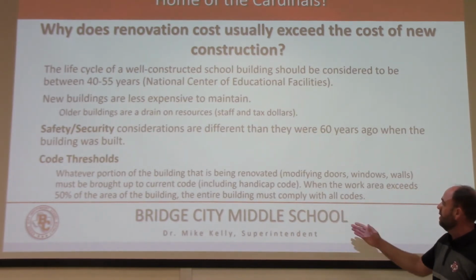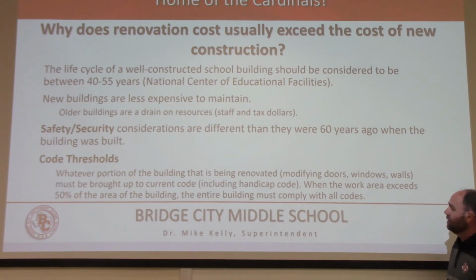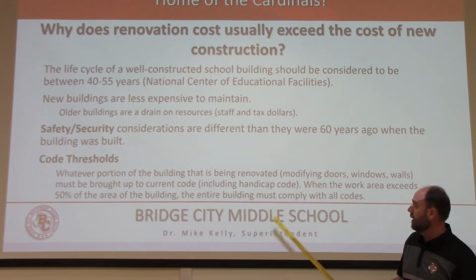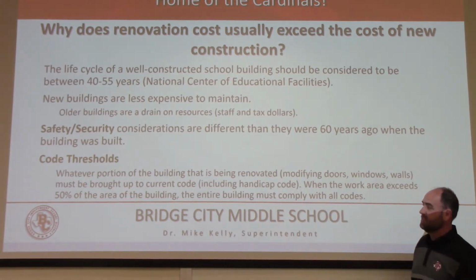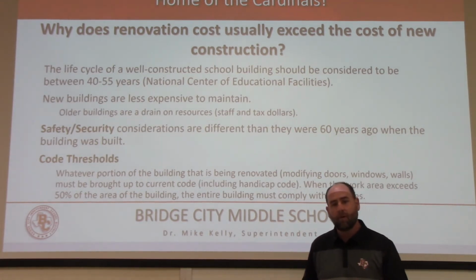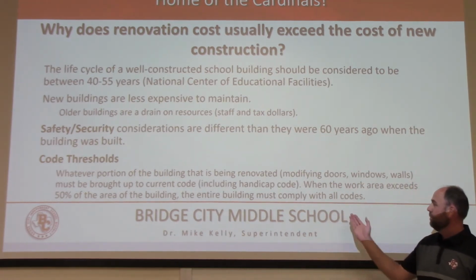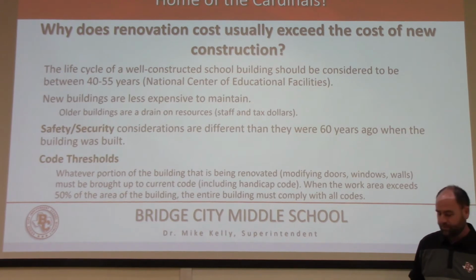Whatever is being renovated, whether you're modifying doors, windows, walls, that must be brought up to current code, including handicap code. And when the work area exceeds 50% of the building, which our work area would no doubt exceed, the entire building must comply with all codes.